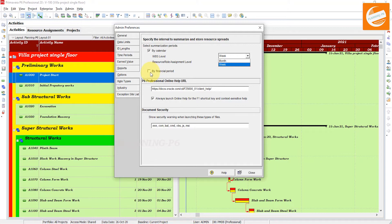Three things to note: First, you cannot clear both 'By Calendar' and 'By Financial Period' checkboxes - at least one must be marked. Second, if financial periods are not defined in the Financial Period dictionary, you can select this option but the data will not summarize by financial period. Third, if you choose to summarize by both calendar and financial period intervals, the summarize job will take longer to run.